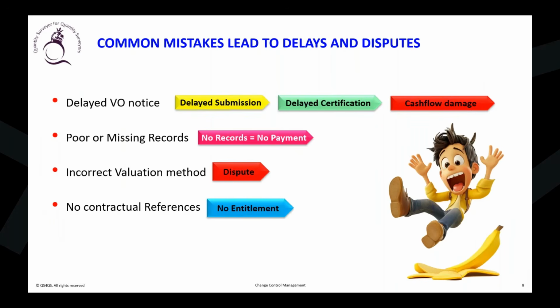How do you know what additional cost and time you can claim under the contract? So therefore, understand the contractual relationship with the particular element of scope of work, either original contract work, or varied work, or additional claims that are not a variation and not original scope of work, but something beyond it.